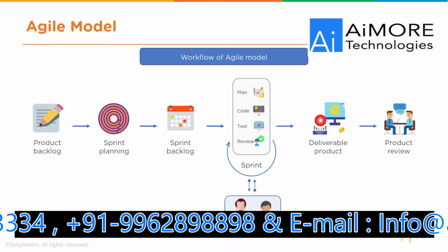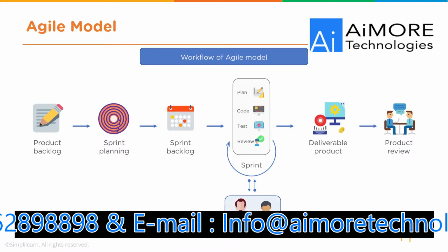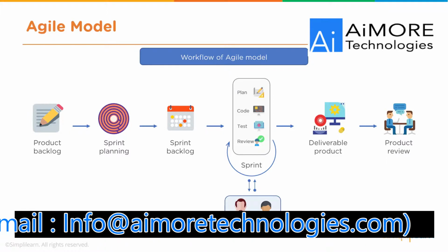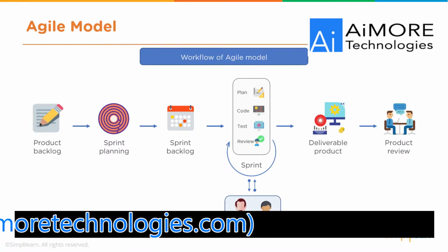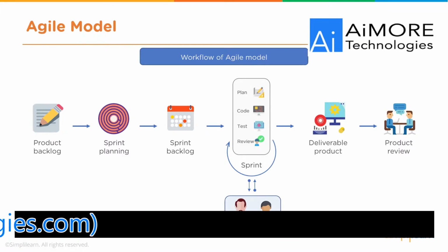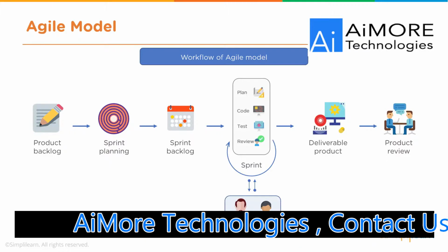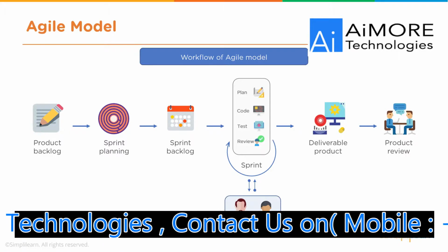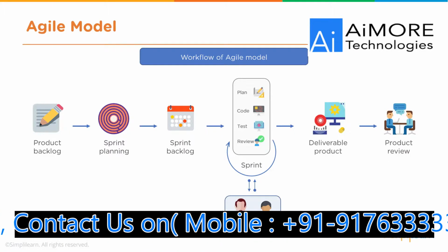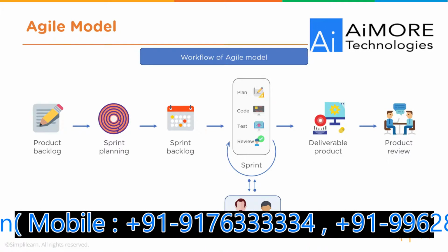And then once you actually start running your sprint, again, it's a 2-week activity. You meet every single day with the actual sprint team to ensure that everybody is staying on track, and if there are any blockers, that those blockers are being addressed effectively and immediately. The goal at the end of the 2 weeks is to have a deliverable product that you can put in front of the customer, and the customer can then do a review.